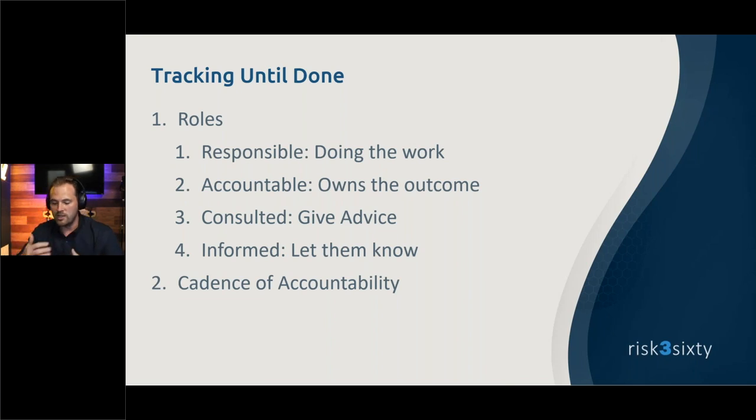From a project management perspective, you need to know all of that information across all of your gaps to actually see it through. And then you're also going to create a cadence of accountability. For example, maybe you have a weekly project management status meeting or something similar to keep those gaps rolling, keep resolution happening, and keep the whole team abreast of how things are progressing. So make sure you have that cadence of accountability. This whole project management tracking-till-done section, watch that other video. I'll cover it in great depth. I think it's a great resource, and we'll link to it in the description so you have it. But just keep in mind that part of the maturity assessment is this tracking process.